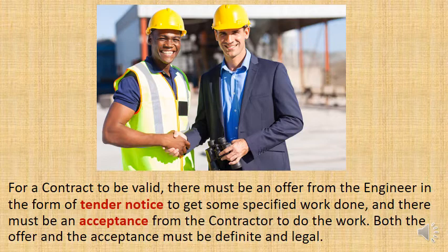The tender documents become a contract the moment the engineer and the contractor sign the acceptance letter. And so from that, you've got a contract. This is why we can easily subcontract work out to different companies for different parts of the project.